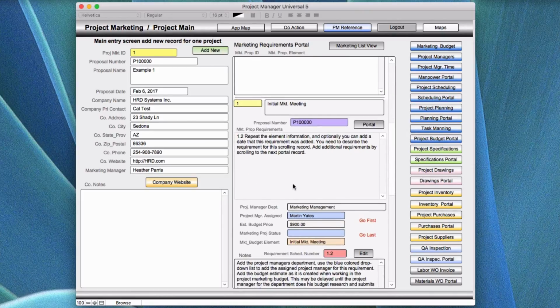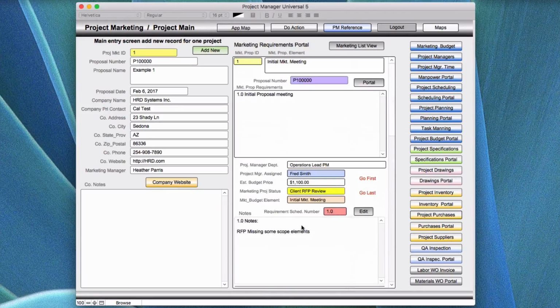Now, if you're running down to the thing like survey, and they give you a rough estimate from the marketing group for the full price of it, it may be a limiting factor. In other words, they have measured maybe that the prior work that they've done in the past should not exceed a price of a certain amount to that particular element. And it's up to the project manager for, say, survey to make sure that that number matches, or if it's going to increase by some amount, then he wants to notify the people in the marketing group that it may exceed their price, because basically he's looking at his cost. If he has the loaded numbers and knows what it's going to cost for that thing to be loaded, say it's 35% loading, that includes G&A and profit, then you know that this is not going to work and you need to let the people at marketing know that. But you start out with estimates.